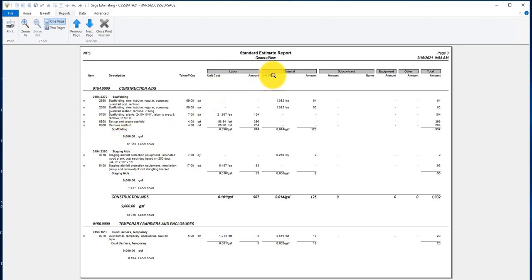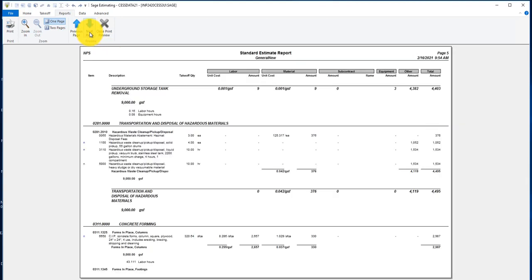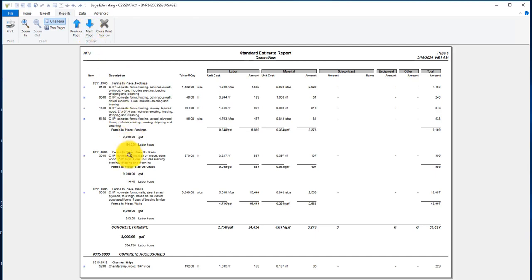And it's giving us all 5 cost categories, along with some other information like hours, automatic subtotals, automatic formatting. Not much for you to do other than just name it, click the button, and you'll always get this really good looking report out of CESS. And you can roll these up to the phase level, the group level. You can choose uniformat. All the sorts and sequences are available to you here.